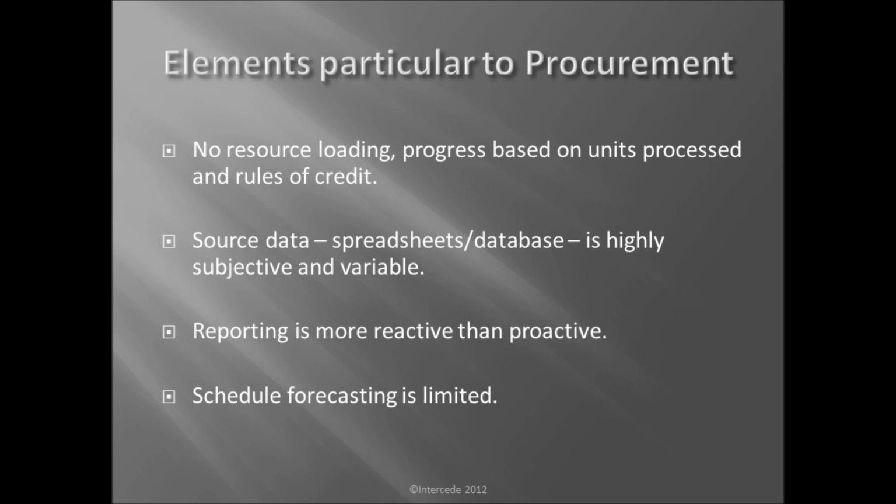I find that tracking progress in procurement is best done on the units process. They don't keep time cards according to what piece of equipment they're working on, and so you would never be able to run an earned value system in procurement.